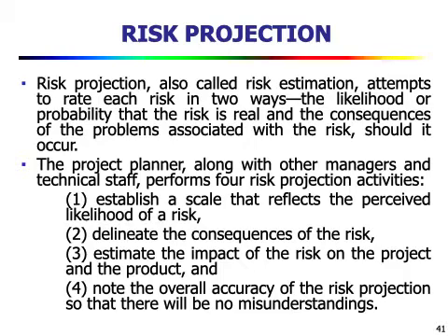So the project planner, along with other managers and technical staff, perform 4 risk projection activities. That is, you establish a scale that reflects the perceived likelihood of a risk, then delineate the consequences of the risk, and estimate the impact of the risk on the project and the product, and note the overall accuracy of the risk projection so that there will be no misunderstanding.